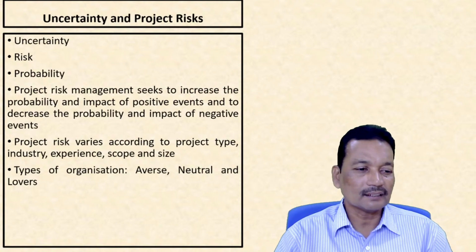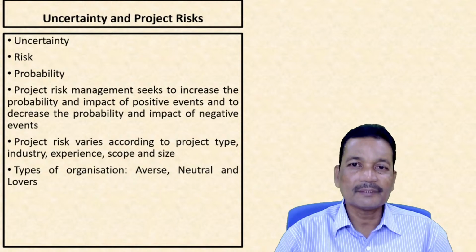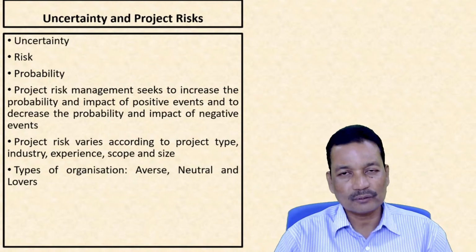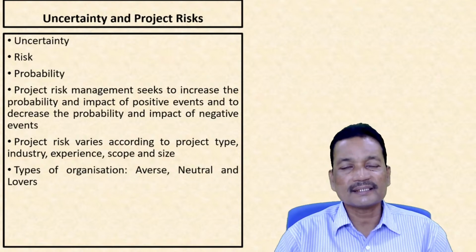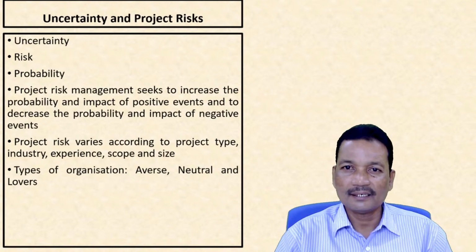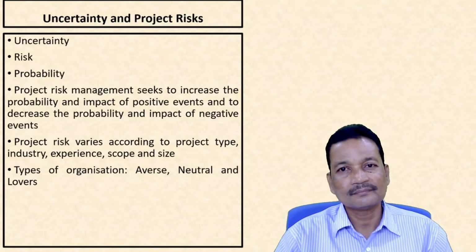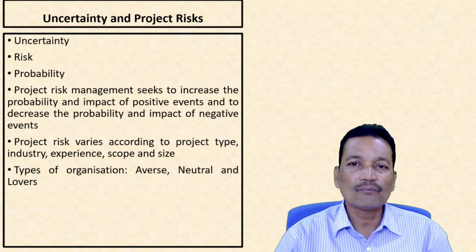However, look at another case. The duration of that activity, which was planned to be completed in 14 days, actually takes 19 days. Now here we are having a deviation of 5 days.